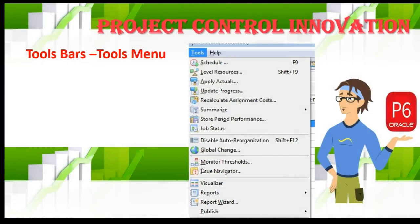The Tools menu helps you manage schedules — calculating early and finish dates. You can do this by pressing F9 or go to the toolbar to Schedule. You'll also find Level Resources if you'd like to level your resources, and Apply Actuals to update progress — or you can do it manually, which I prefer. Other functions like Store Period Performance and all kinds of reports will be explained when we open the software.